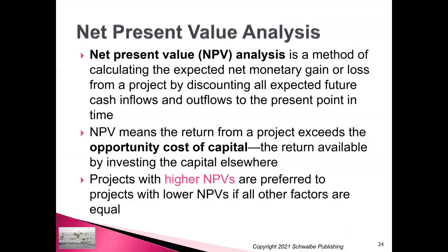Okay, coming back now, net present value analysis, ways to assess at the C-suite should we choose this project. So net present value is one way to do that. Net present value, NPV, refers to the difference between the value of cash today and the value of cash in the future. If this project is going to cost me $100,000 over 2 years, right, then at, say, 8% interest, it's really costing the company $120,000, etc. That's the essence of net present value.